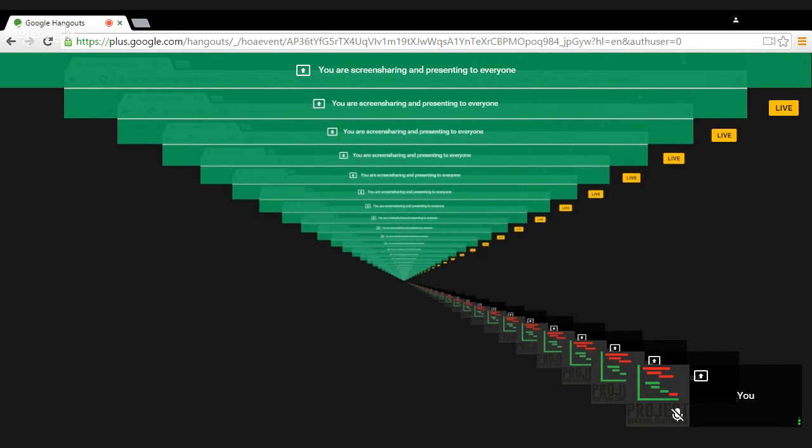So our first idea here is talking about, well, why do we save a baseline? And the answer is really quite simple. We save baselines in Microsoft Project once we've finished our planning stage and before we start executing it. Now, you don't necessarily have to baseline an entire project. If you're working more on a rolling wave, the classic being software development, well, until we do the requirements, we really don't know what it's going to take to construct it and test it and deploy it.